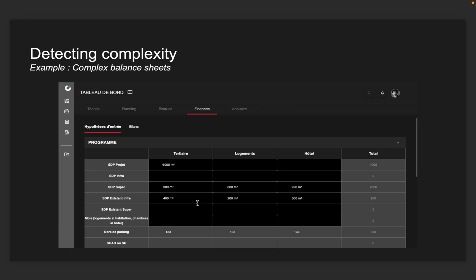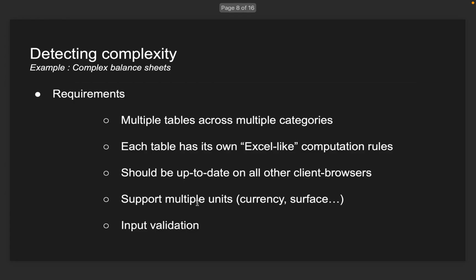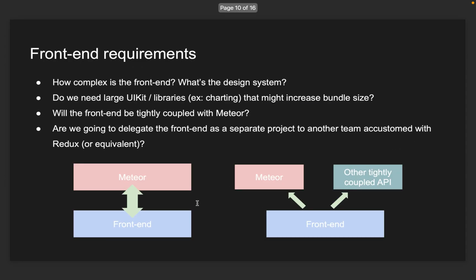lags or slow lags. And also, when we needed to validate the ability to do this online, we took the same POC, deployed it on Meteor Cloud, and then saw that the latency was not that bad. And this allowed us to confirm to the client that this is feasible, okay? So this is a typical approach that we follow to de-risk complex tasks.